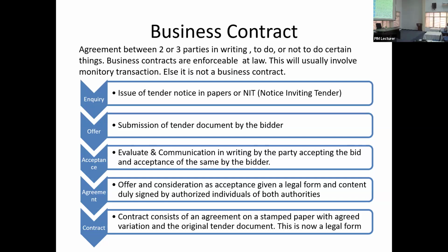They then have a communication with you and they write to you and say, we are accepting it. They may negotiate and say, okay, we are happy. We will now send you a confirmation. We are accepting it. Now this alone is enough. But we go a step further and we have an agreement. Right? We sign an agreement. I'm offering this for this consideration. And then that goes to the two lawyers, who will fight it out into a legal form, a legal contract.